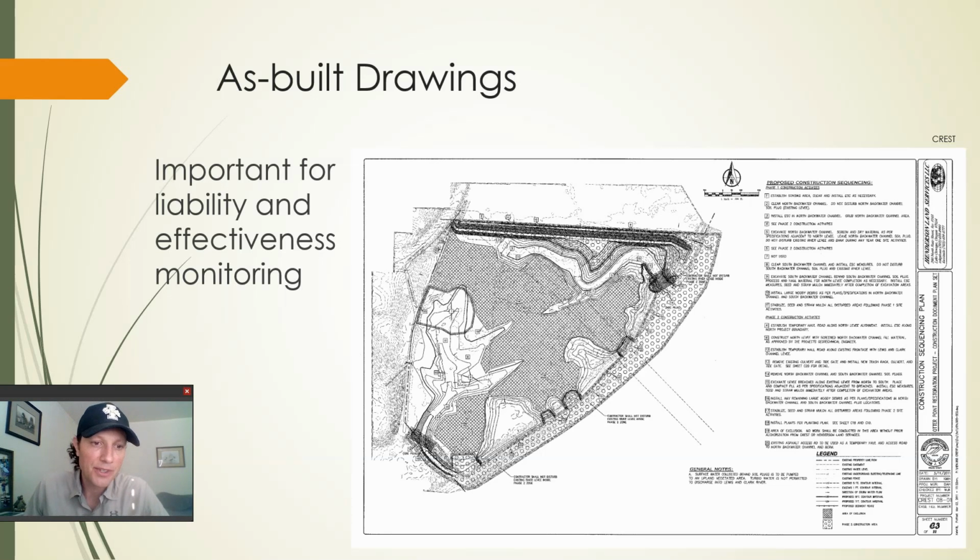If a funder comes to you and they only have the initial conceptual drawing, and they've visited the site and they realize, wait a minute, this isn't what we thought we were funding. This is not what we thought we paid for. That's going to be tricky. You're much better off if you provide as-built drawings to everyone involved, the permitting agencies, the funders, etc., so that they all know what was, in the end, completed on the ground, and there's no miscommunication there.